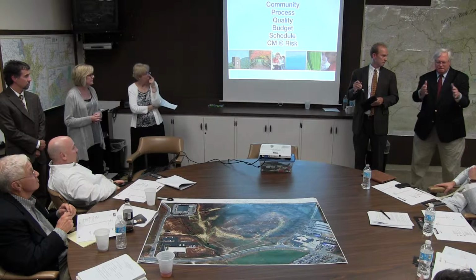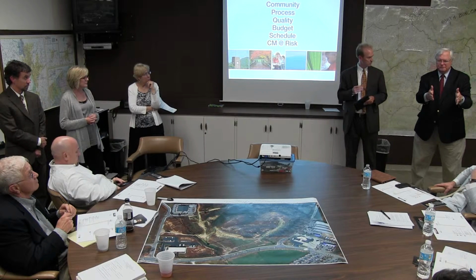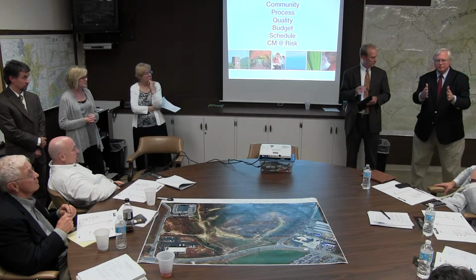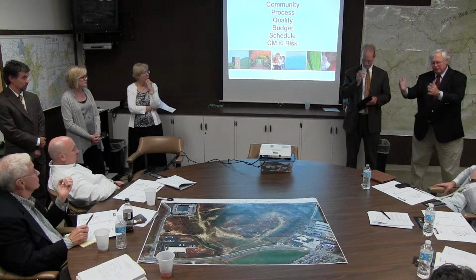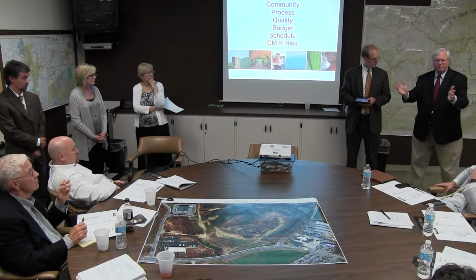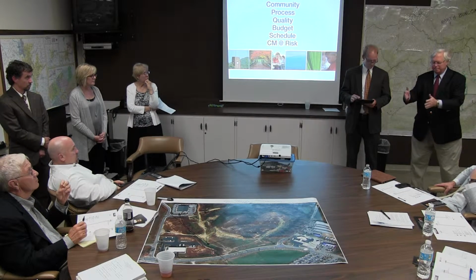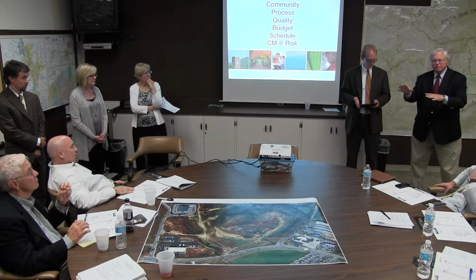You kind of look quickly at it in three parts. One is the owner requesting. It's just sometimes, as fast as this thing's gonna go, there's sometimes when you just wanna add something. So that's a number. Then there is the unforeseen conditions part of this. There may be something under the ground, whatever. And then there are designer error things. And you kind of parcel those out into three different things and begin to look at them independently.